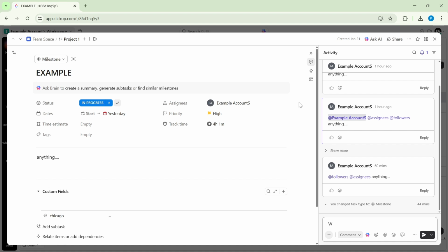You'll usually see a visual indicator, like a diamond, and the task will stand out on Gantt charts and timelines. It will also be easier to highlight in reports and status updates. A few quick tips to keep things tidy. Keep milestones focused on the most meaningful checkpoints, not every small task. Align milestone due dates with key project phases, so your schedule tells a clear story.